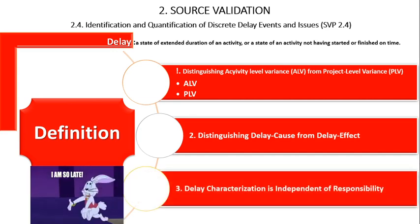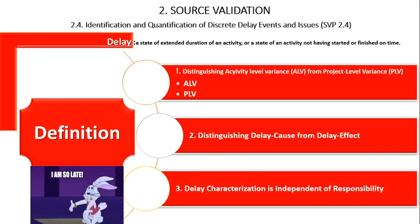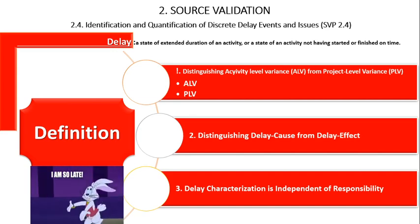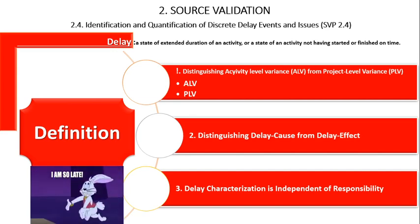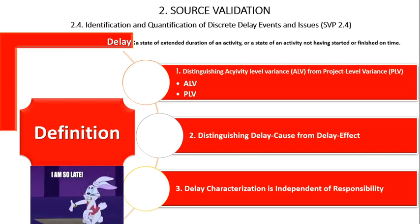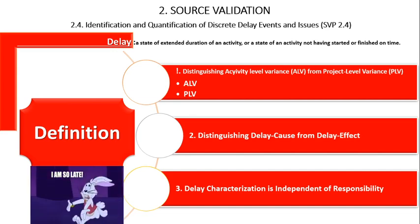The third point about delay characterization is that it is independent of responsibility. Activity-level variances are considered delays independent of the responsibility for those variances. Thus, an activity-level variance can be contractor-caused or owner-caused, but it is still a delay. Similarly, the characterization of delays as excusable, compensable, concurrent, and past are attributes assigned well after the initial delay analysis, based on the causation analysis performed after the schedule analysis is completed.